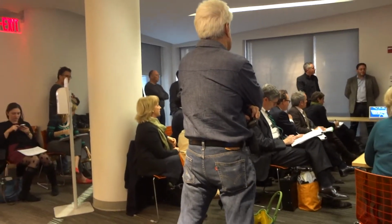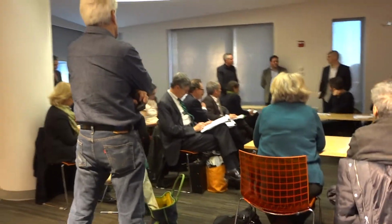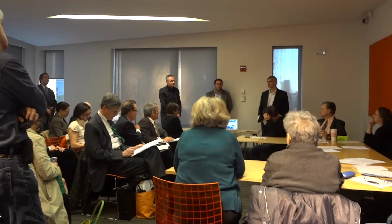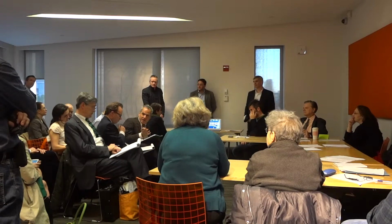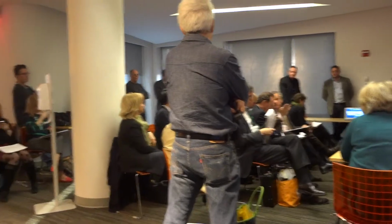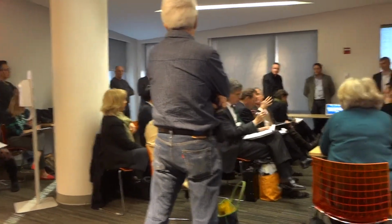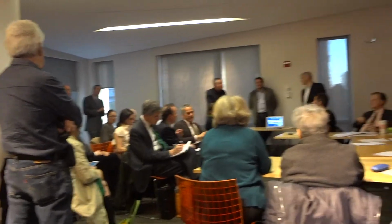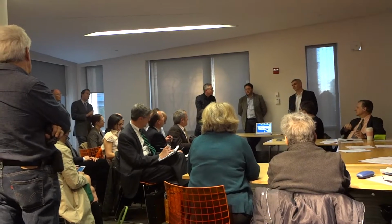We're building out this space along with the rest of the space. The people we pick will in some ways have to conform to what we're building out, and in some ways they'll be able to add to it, so it's not going to be a long, drawn-out construction. So you're handing it over June 1st, more or less? It'll be sometime in June, depending on how long the punch list items take. And that's just handing it over, so with 3 or 4 months for their work, we're looking at an opening date of... Well, actually, we should ask them what the time is. We're shooting for Memorial Day.